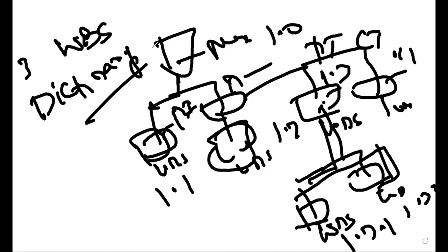All the technical information, bill of quantity, method statement, technical performance, quality performance, procurement, resources, delivery, ID, everything goes into this technical document called the WBS dictionary. Each and every WBS component is defined in detail, and all the technical and administrative information goes into the WBS dictionary. So this will be the third document in the established scope baseline.